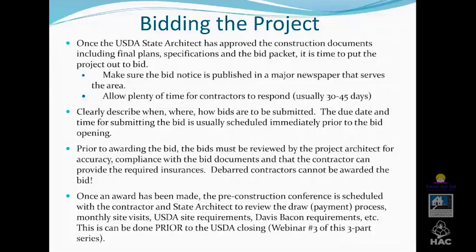And then another aspect that I wanted to mention is that to submit your building permits once rural development approves those plans, because that also can be a process on the part of the municipality who's reviewing those documents, and you want to allow time for any comments that they may have. So I think the best advice is to be looking at how you can take all these steps on simultaneously to ensure that everything comes down to a timely conclusion at loan closing.